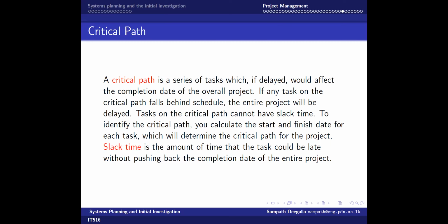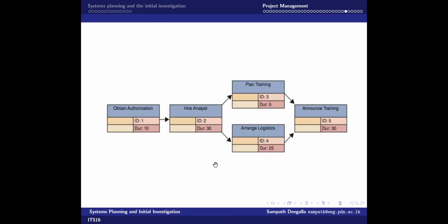So this time we call slack time, right? Slack time means you can delay the start of a task without pushing back the completion. But in the critical path, there's no slack time, right? There's no slack time when it comes to the critical path.